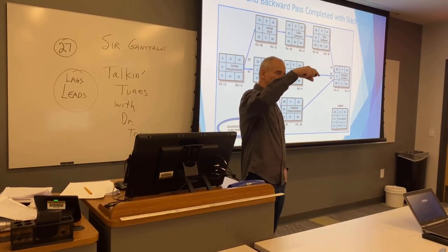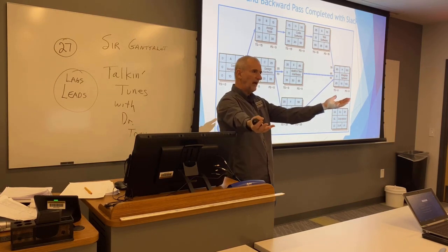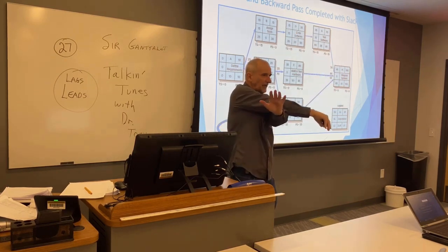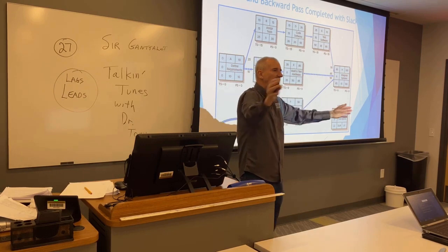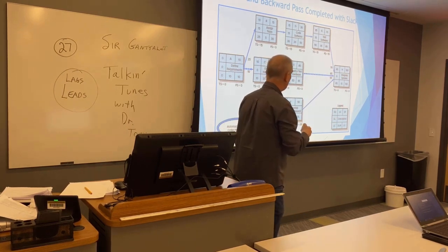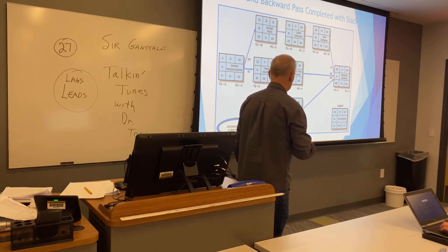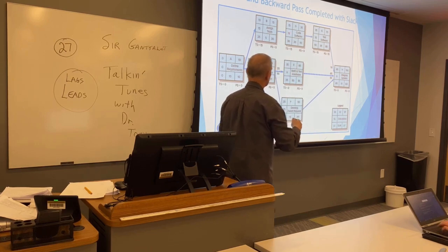I can do it at the beginning, or I can take 5 days in the beginning, 10 days at the end, or 10 days at the beginning, 5 at the end. I can take 15 days anywhere between day 35 and day 85. And likewise down here, I can take 35 days anytime between the start and finish. So here we have 15 days slack here.